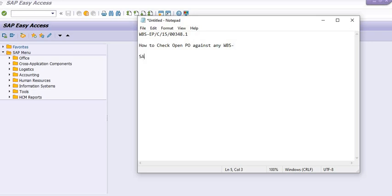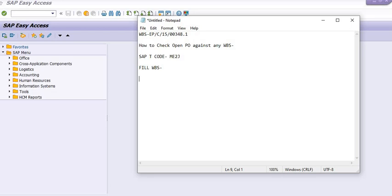We have a SAP transaction code ME2J. Fill the WBS number and for layout you need to choose ALV instead of best.